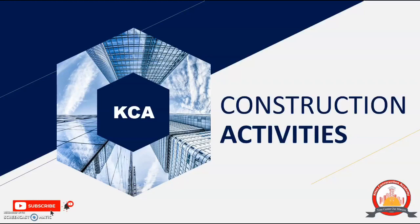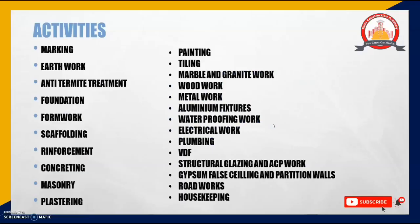The construction sequences involve marking, earthwork, anti-termite treatment, foundation activity, formwork activity, scaffolding activity, reinforcement activity, concreting, masonry, plastering, painting, tiling, marble and granite work, woodwork, metal work, aluminium fixtures, waterproofing work, electrical work, plumbing work, VDF work, structural glazing and ACP work, gypsum false ceilings and partition walls, road works and housekeeping.